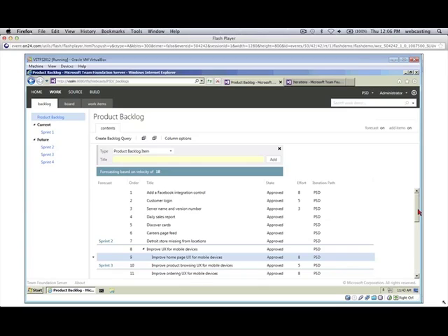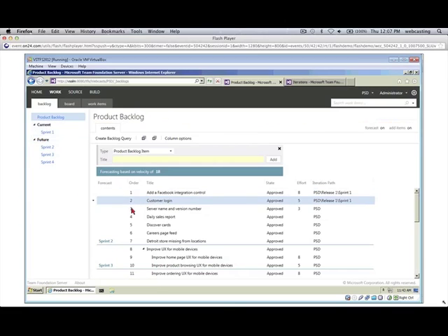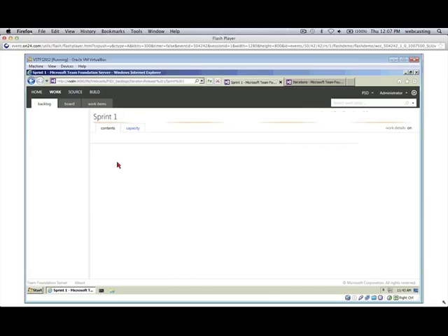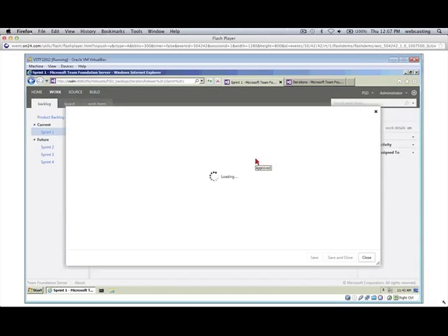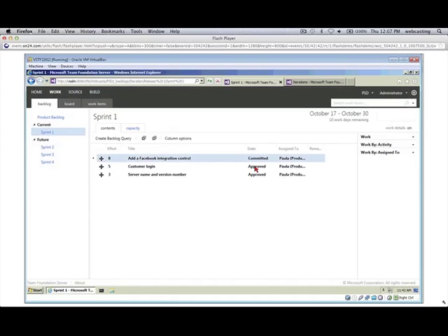So you, as a team, should always forecast a comfortable amount of work using the velocity and this forecast tool here as just other inputs for that discussion. And if we decide, yeah, this looks good, we're going to go ahead and take these PBIs over into sprint 1. You can just drag and drop these guys up here. And then if you bounce over to sprint 1, you'll see these listed. Should probably mark them as committed as well. Although we don't use that term anymore in sprint planning, we use the term forecasted, but the tool still uses the state committed. It basically means it's planned.